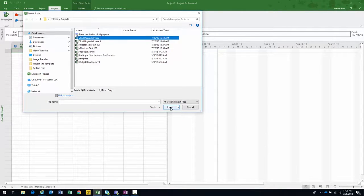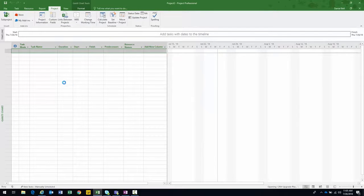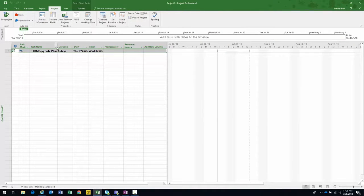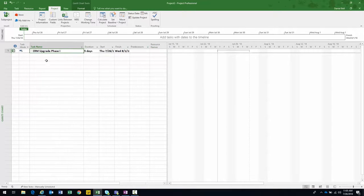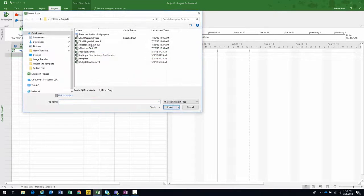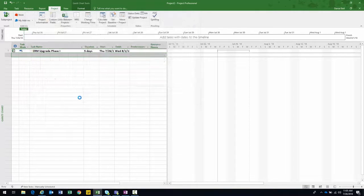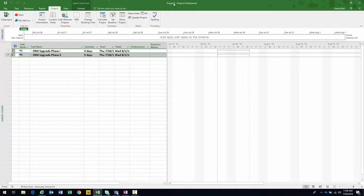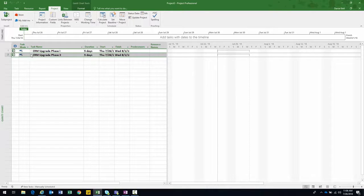I select Phase One and click the Insert button — there it is. Now let's add Phase Two right underneath. I click Sub Project again, select Phase Two, and insert it. So now at the top header bar you see this is Project Two — a temporary blank project. I'm using it temporarily to open these two projects because this is the mechanism by which I create the relationships.